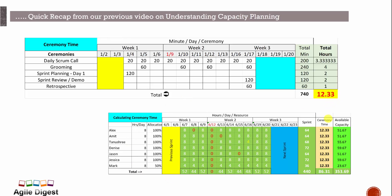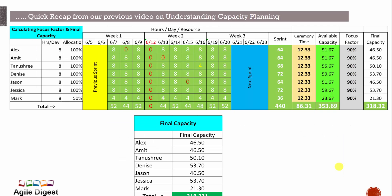After subtracting the 12.33 ceremony hours, the capacity comes to 51.67 hours. Then we apply the focus factor — we're taking 90%. For details on focus factor, visit the previous video on understanding capacity planning, or visit agiledigest.com. The final capacity comes to approximately 46.50 for some members, 50.10 for Tanushri, and 53.70 for Denis.